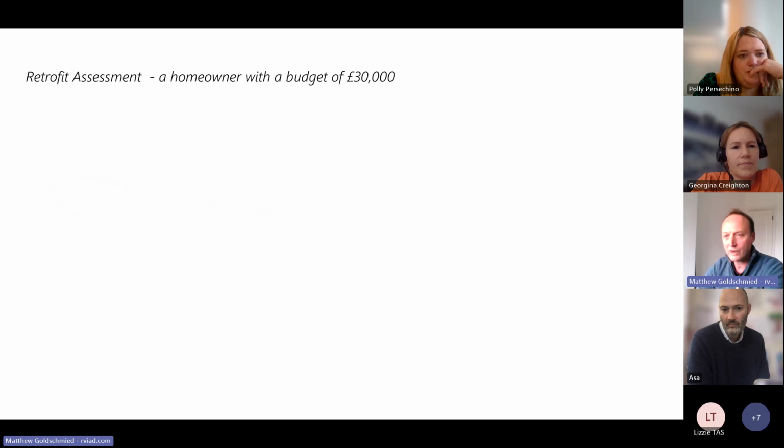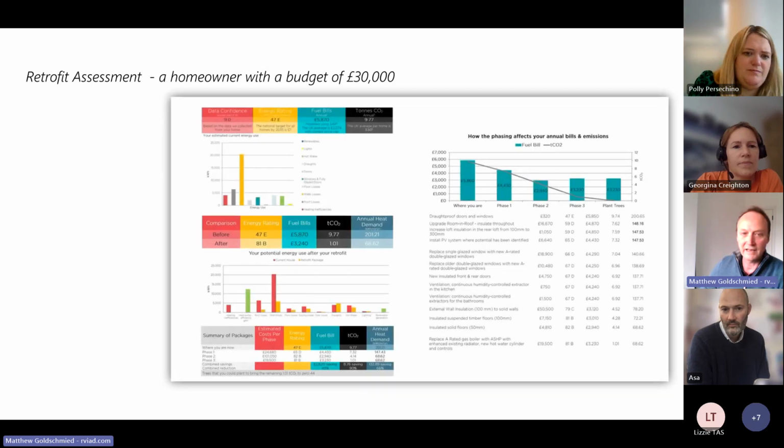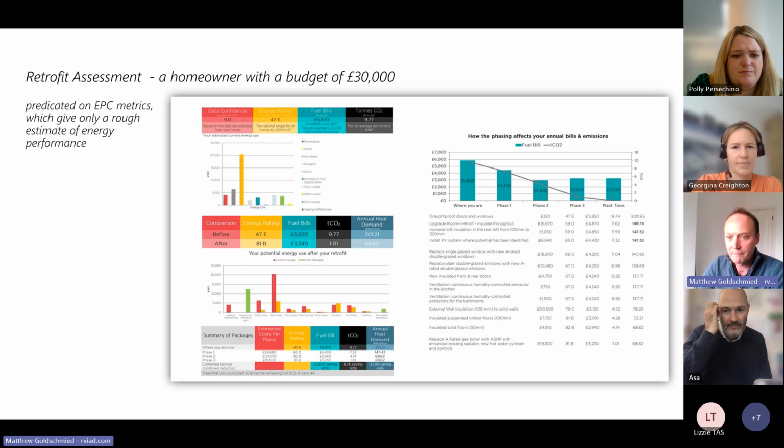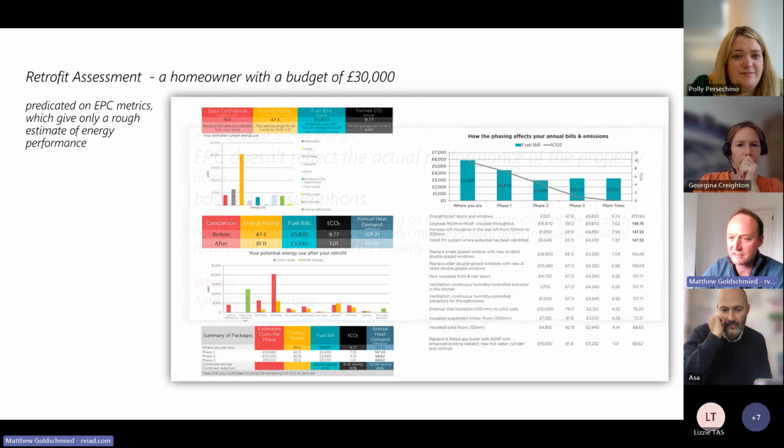So a quick look at a homeowner I encountered with a budget of £30,000 who got a retrofit assessment done by a very reputable surveying company, which takes the EPC metrics of the home, and ultimately it tells him he's going to have to spend, you add up the figures in the red column on the bottom left, £143,000 plus VAT, plus consultants' fees, plus all the other costs associated with it. So it's completely impractical for him.